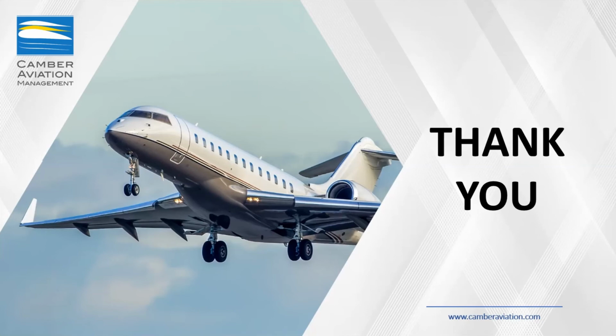And if you're going to have, let's say, a 10 or 15-year-old ACJ 319 or a BBJ 1, you'll be able to purchase an aircraft in good condition, so a good pedigree, we call it, for somewhere between $15 and $20 million. And depending on what you have to do on the interior of that airplane, again, you try to find one that's close to what you already want so that you don't have to invest quite as much. You'd be looking at anywhere between about $5 and $15 million.